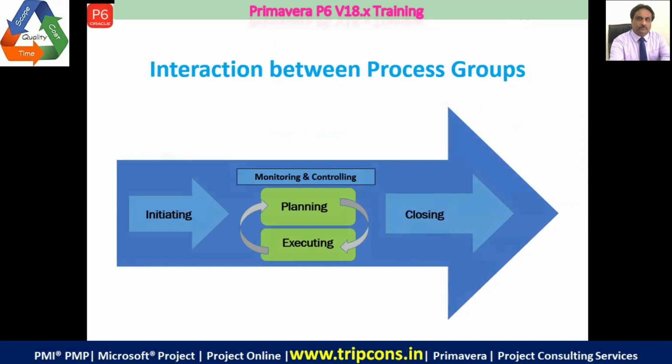So in the closing, what do we do? We close the work of the project gracefully. We clean up the work site, we document everything, we hand over the finished product or the item to the client. We transfer it to the operations or the production group. Okay, the finished item or software or infrastructure.